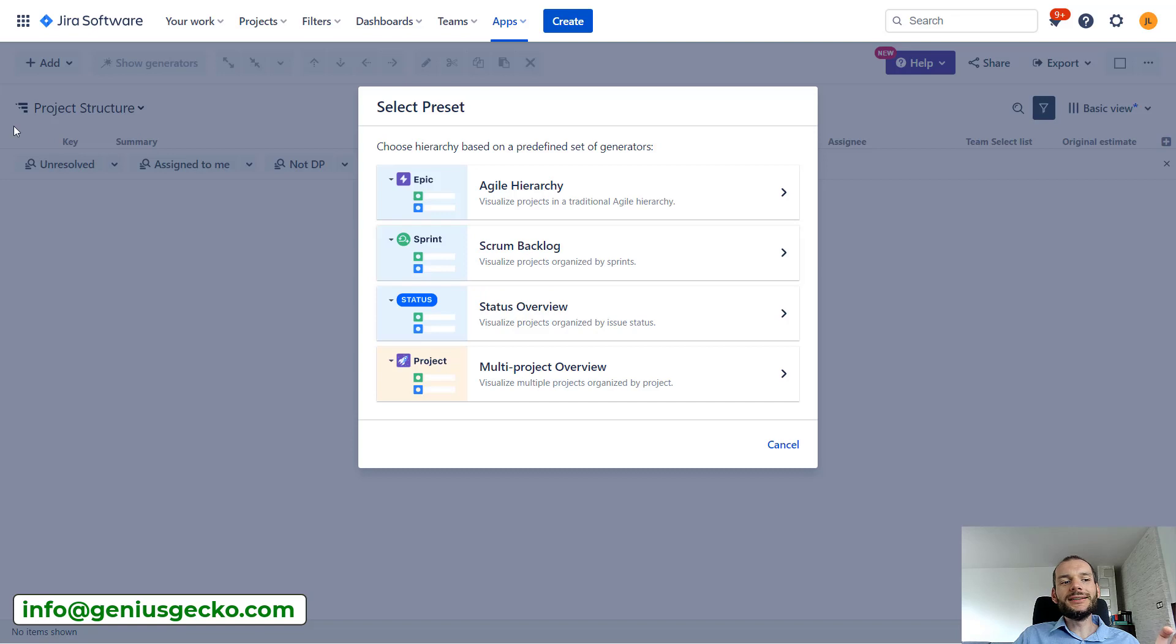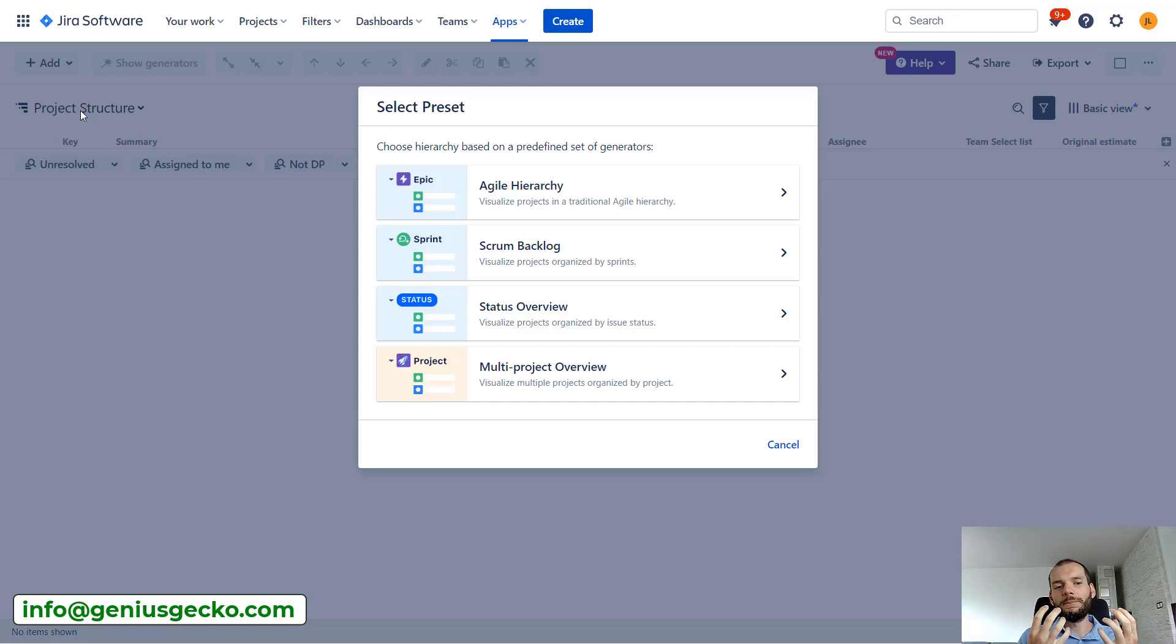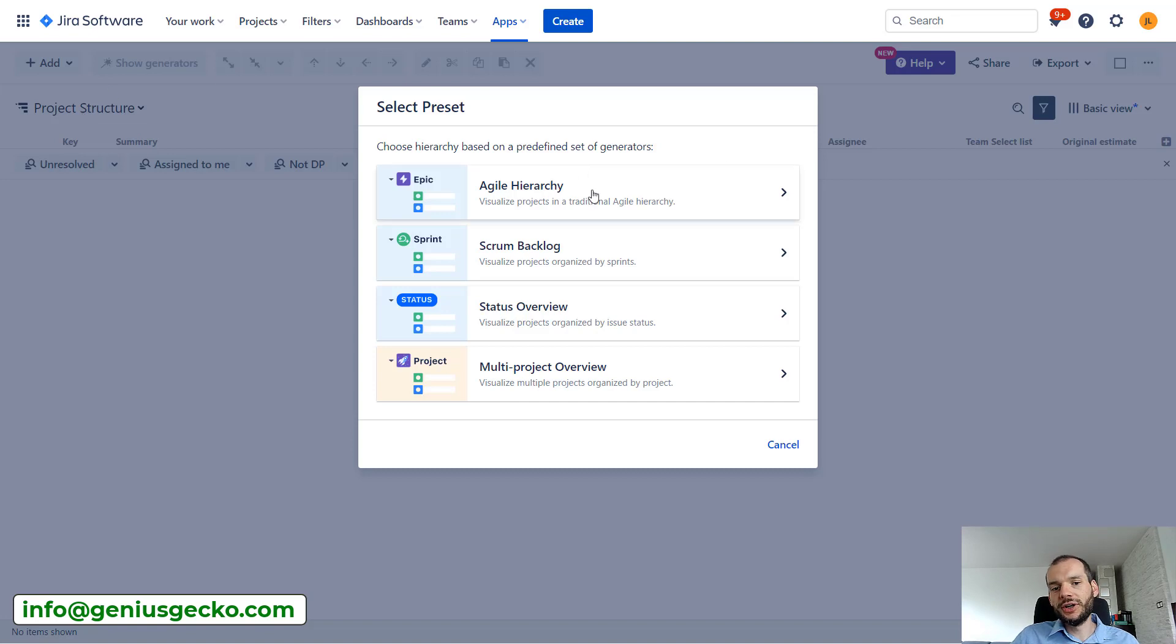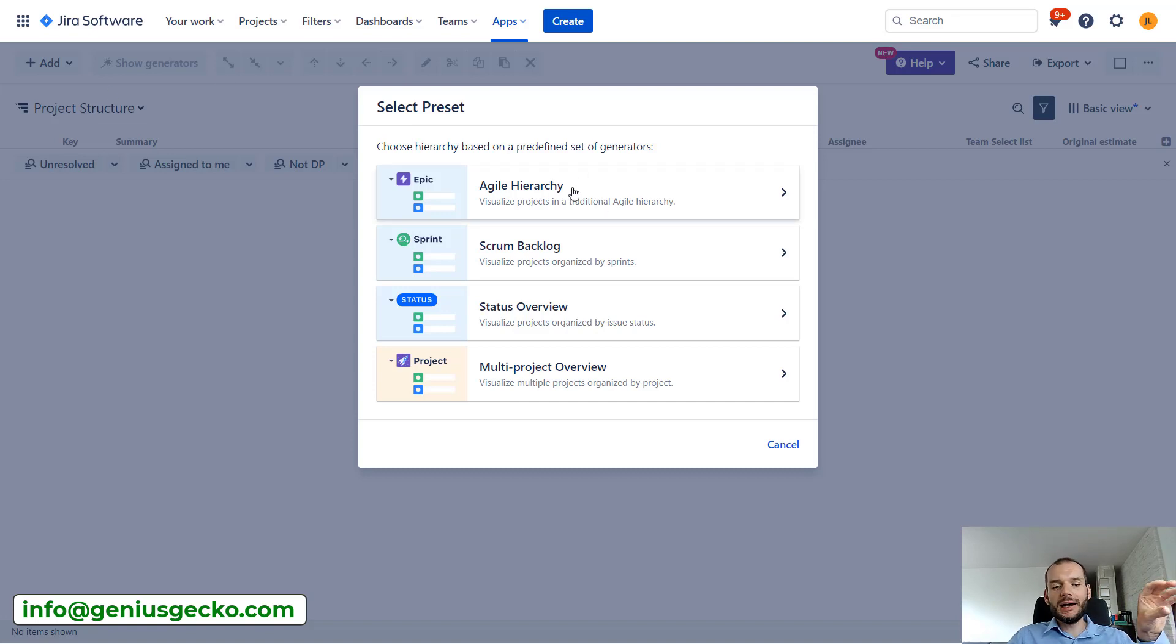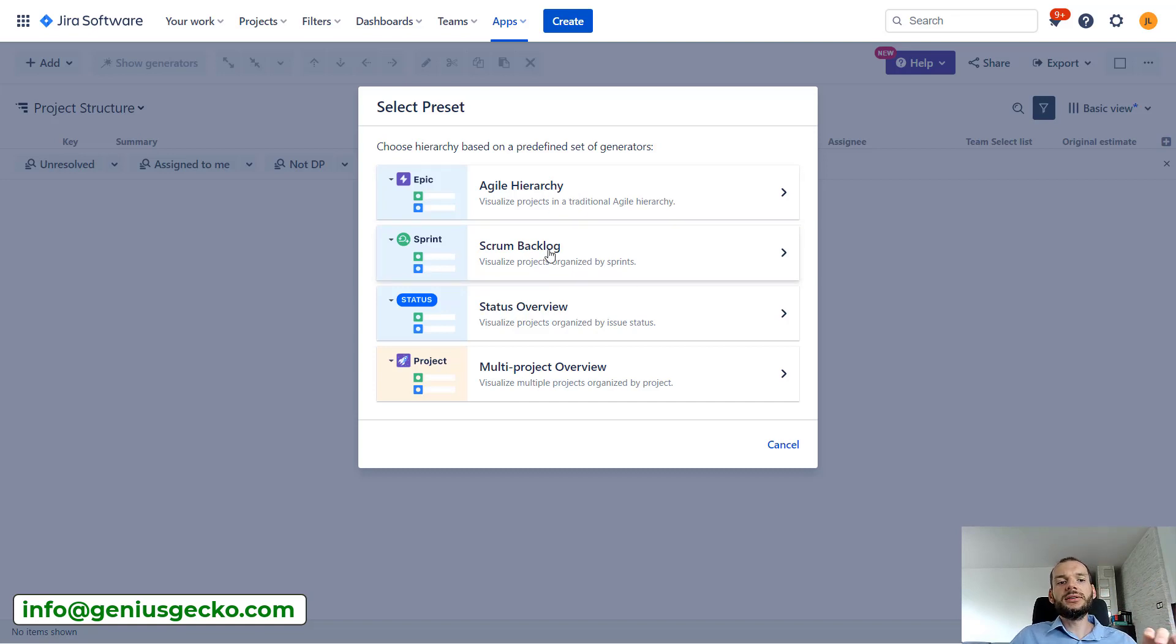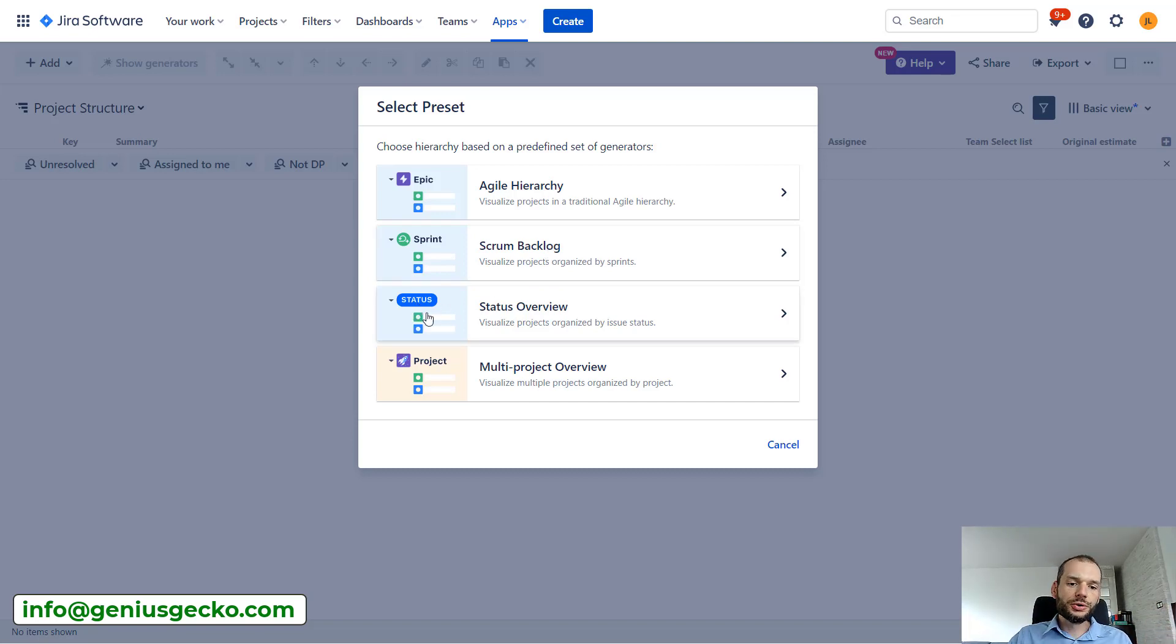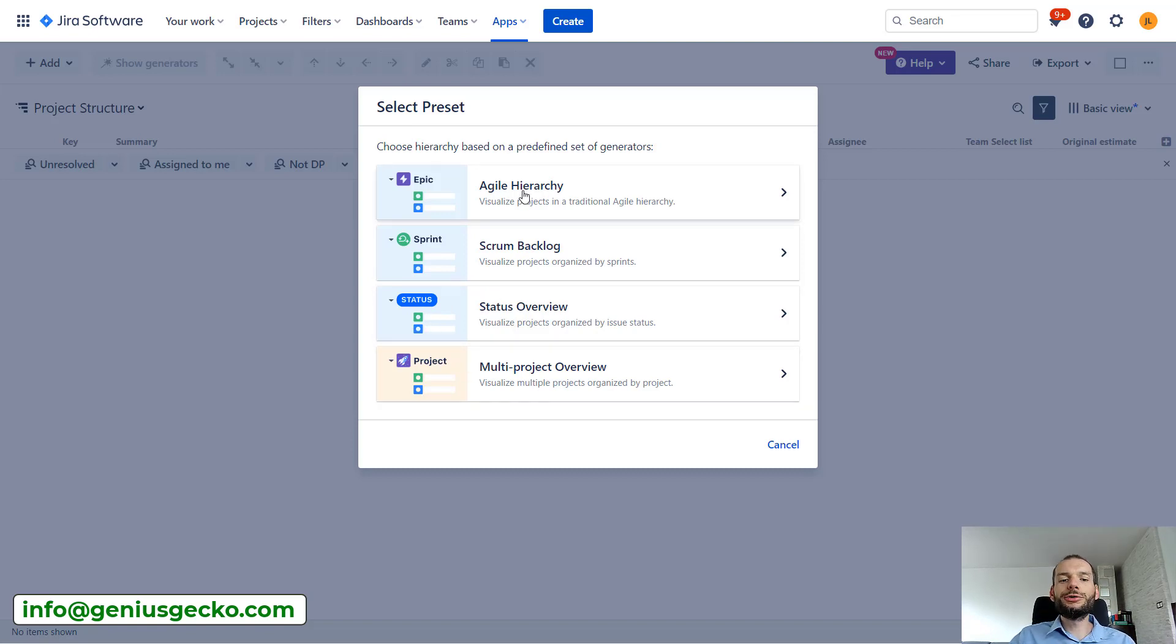This allows us to create that structure or hierarchy of issues based on a template. So over here we have agile hierarchy: epic at the top, below that issues that are within the epic, sprint - basically element representing sprints and issues within the sprint, also issues grouped by status or by Jira project.